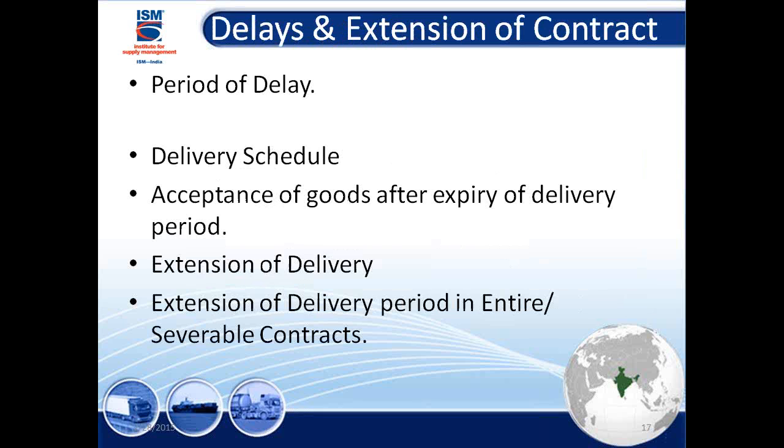Now, delays and extension of the contracts. This delay part is very critical and we're going to touch on it, particularly liquidated damages. The period of delay, is it 1 week, is it 2 weeks? That could happen. But in principle, if time is the essence of the contract, no delay. And if you have spelled it out in the contract that time is the essence of my contract, any delay means there are going to be damages. Certainly, delay means there are some damages.